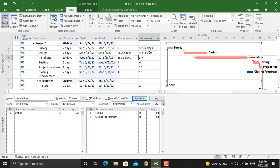Beside that, if you want to change the relationship type which we had four types of relationships which was the finish to start, start to start, start to finish, and finish to finish, for example the closing procurement which is connected to activity number four which the installation should be start to start.